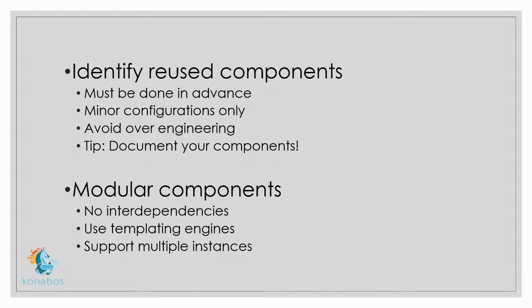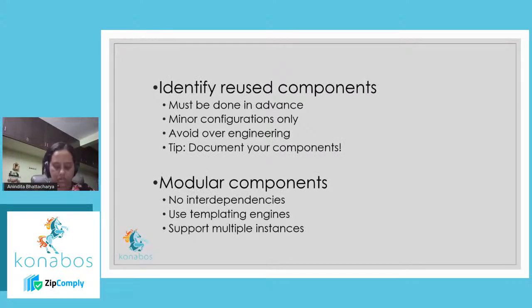But keep in mind that when you have more components, it's also tempting to just keep things really straightforward and simple and have more components. But then more components is not just more development time. It's more time from project management perspective, the BA perspective, for documenting tickets, your front end, back end, QA, documentation, content author training. So it really adds on. So make sure that you kind of maintain this balance between reusing and definitely not overcomplicating stuff, because that again comes with its own can of worms. It's very difficult to go ahead with content author training and also reusing, also maintaining the component.